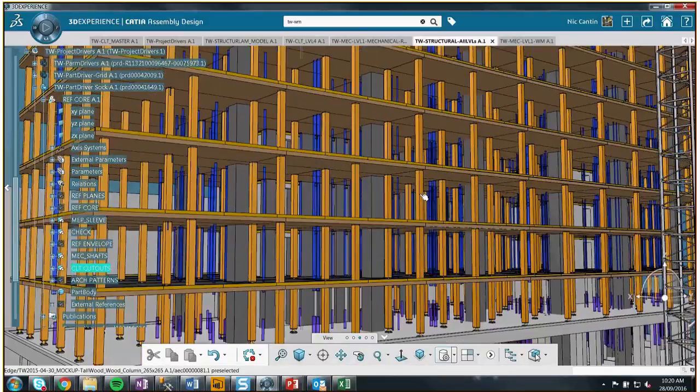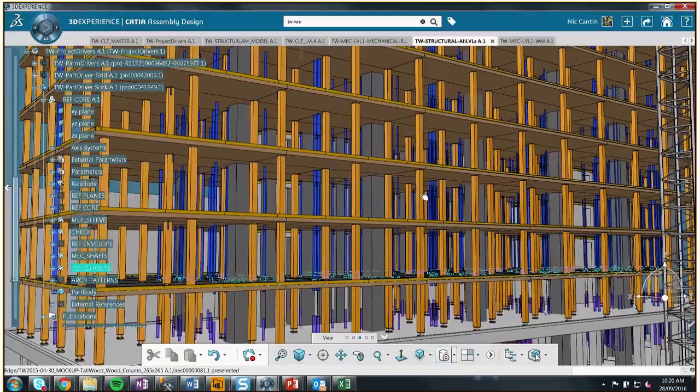I think Nick would be better in our office to answer, but when they had to move an embed slightly or make an adjustment, they were surveying as they went. Whether it got implemented back into the model every time, I'm not sure, but we were aware of it. It was coming out like actual live pictures and survey data to make sure that when those CLT connect to the core, it was going to fit.